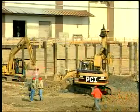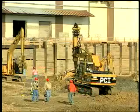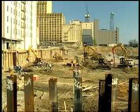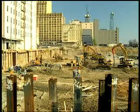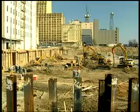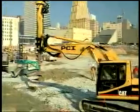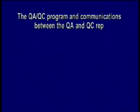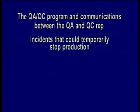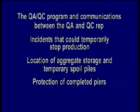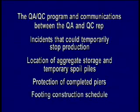A pre-GeoPeer construction conference should be held when the GeoPeer installer arrives at the site. The meeting should include the general contractor, the geotechnical firm of record with their quality assurance representative, and the licensed GeoPeer installer including his quality control representative. Subjects that should be discussed include the QA-QC program and communications between the QA rep and the QC rep, incidents that may occur that could temporarily stop production, location of aggregate storage and location of temporary spoil piles, protection of completed piers, and footing construction schedule.